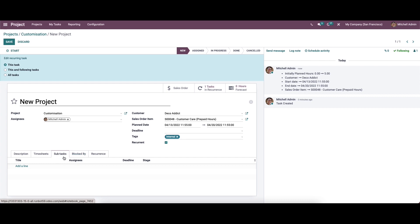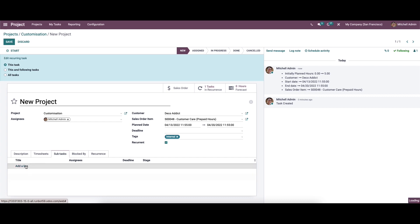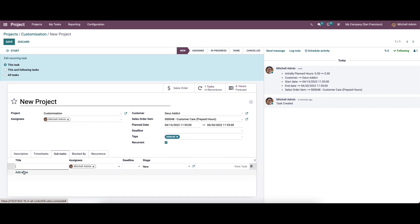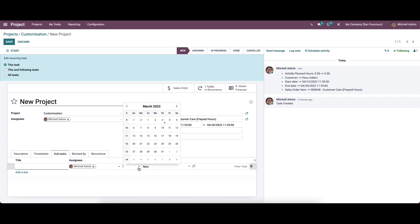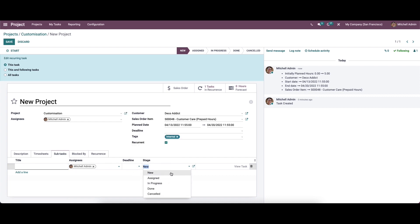Here we have the subtask tab. Using this tab, we can divide the task into subtasks, which helps to organize the activities of the task in a systematic way. While clicking on 'add a line,' we can provide the title, assign a name, and set the deadline, stage, and other details.